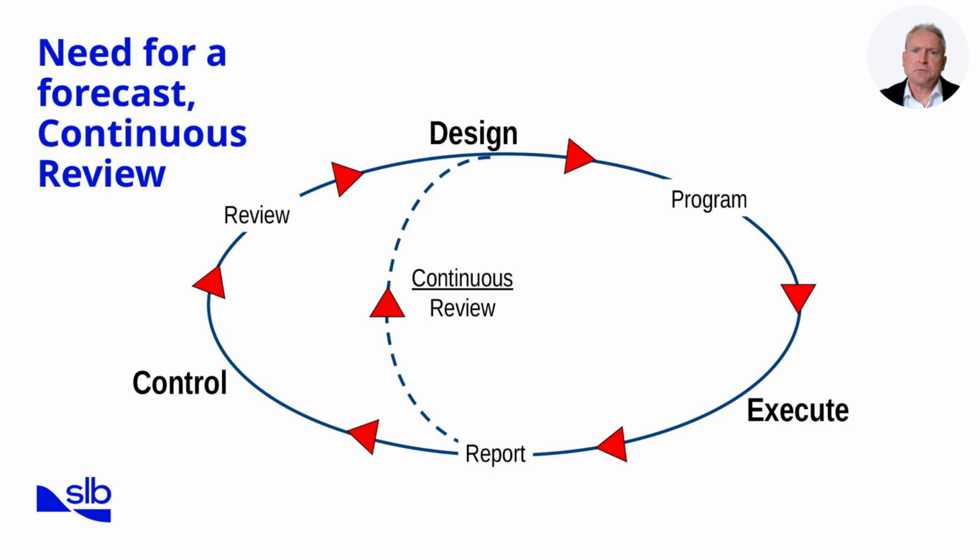Once execution is underway, reporting becomes critical. The performance of each stage is documented, highlighting variances between the plan and the actual results. Finally, this information feeds into continuous review, closing the loop. Lessons learned are captured, risks are reassessed, and plans are revised for future wells. This cyclical approach ensures drilling efficiency, safety, and knowledge growth. In short, forecasts provide the framework for design, control, and execution, but it is the continuous review that ensures they remain relevant. With that foundation in mind, let's move on to see how forecasts are used to assess performance and revise plans.